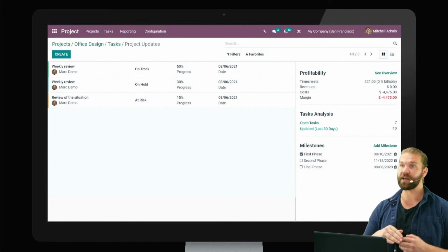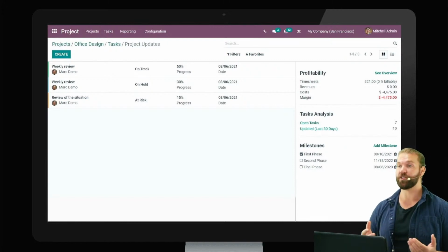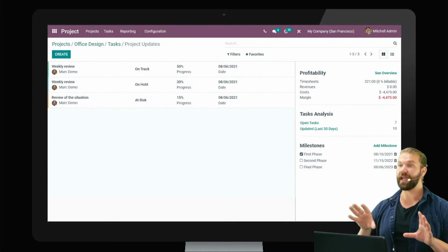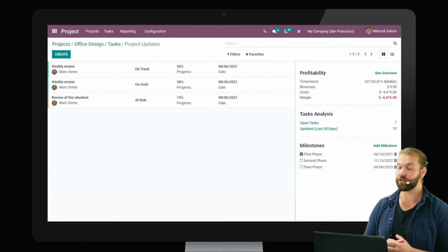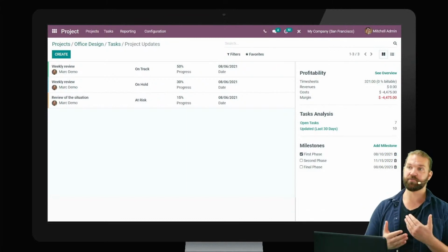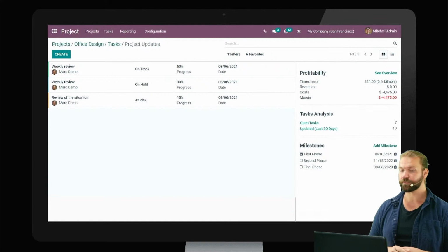So you can specify and customize different milestones per project. And then you can tick them off that they're completed. These milestones are also very visible in later reporting, such as the dependencies Gantt view. Yeah, absolutely. So you can see what they're on in the deadline, so you can decide, okay, this needs more priority over the other tasks.